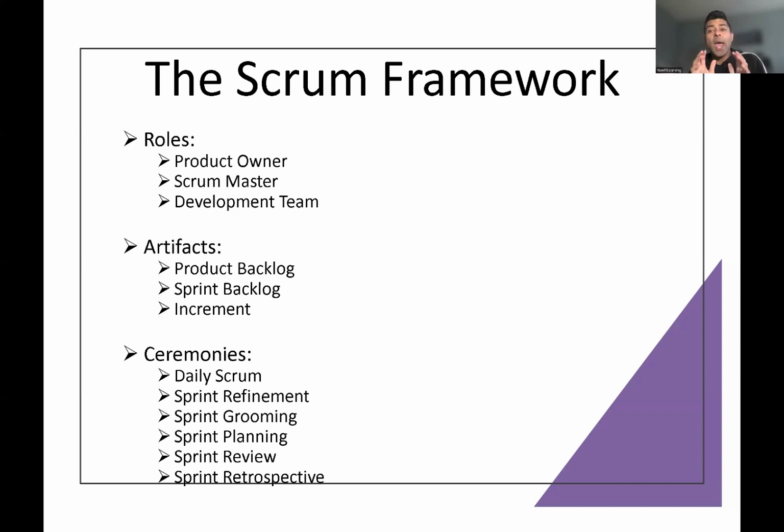So everything you create as a user story which doesn't need to be done right now goes into the product backlog. Your product backlog can be 10 user stories, 15, 20, but I really encourage you to have a good product backlog, because out of the product backlog the sprint backlog comes, which is basically the sprint planning, and this sprint backlog goes to the sprint when it starts.